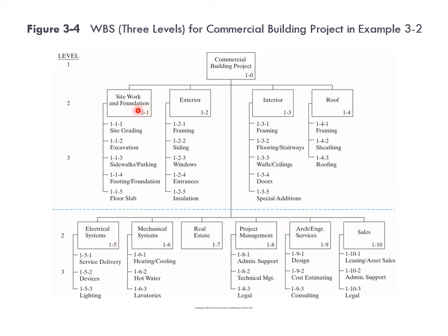And then, as you can see, 1.1 is further divided as 1.1.1, 1.1.2, 1.1.3. So the number of characters in this numbering represents the level. These are level 3 tasks.